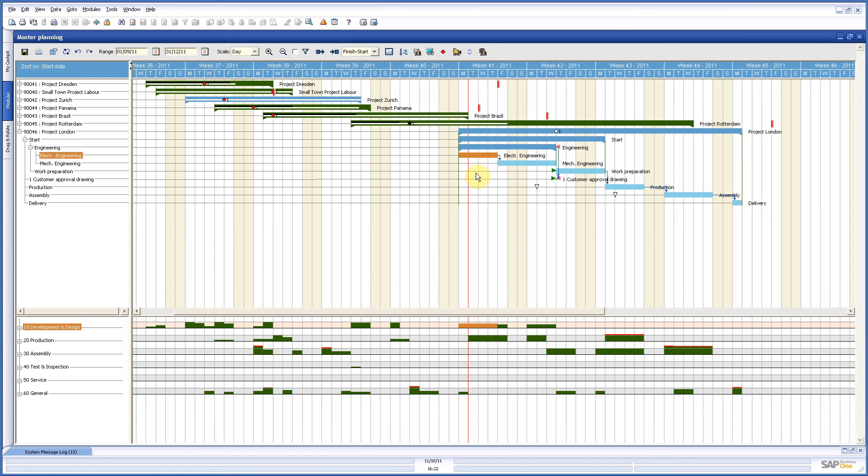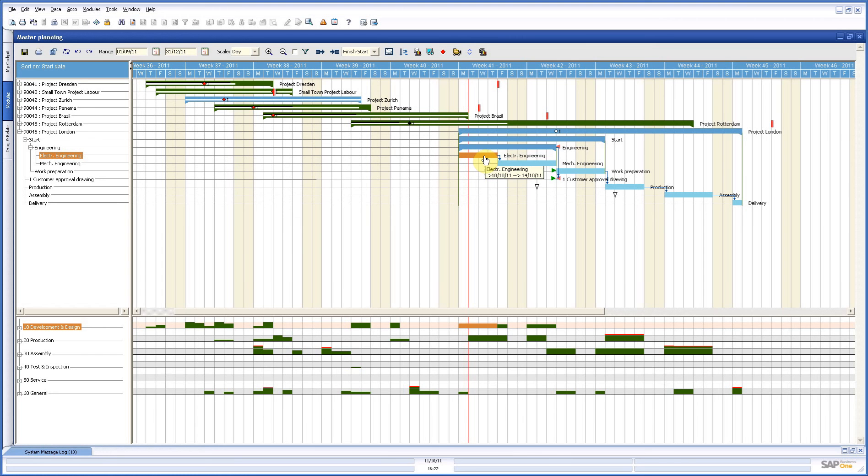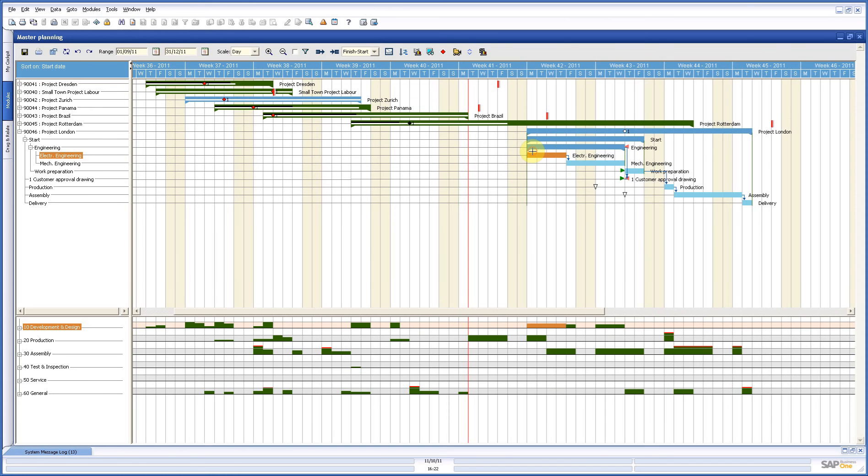Now, we have three types of constraints. This one is the most used. It is a start-finish constraint, which says only if this one is finished, the next one can start. That is the reason that when I put this to the right, everything moves to the right.